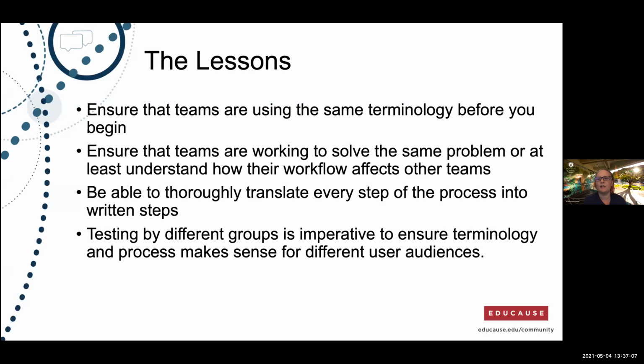Make sure that you're trying to solve the same problem, or at least understand the workflow. The billing was recently taken over by the billing team, so they were just learning how to do the billing process. And we had to work very close together to see how they were going to change it from the historical spreadsheets. We used to bill by a shared Google sheet, and then they would pay by a check. So we had to make sure that we're solving the same problem with our process. And being able to thoroughly translate every step of the process into written steps was key.